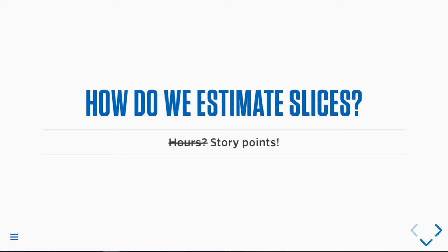So at 4Kitchens, we break our projects up into, I don't want to mess this up in front of two colleagues, after our business development and sales process, discovery, which is what are the problems we're trying to work on here, definition, this is how we're going to solve the problems, then design and architecture. And that's when the backlog of user stories gets built out. Somewhere in definition and design and architecture, we're starting to make lists of epics, and epics are being broken down into tickets with user stories. And because so many clients think very well through design deliverables, they inform each other as you go.